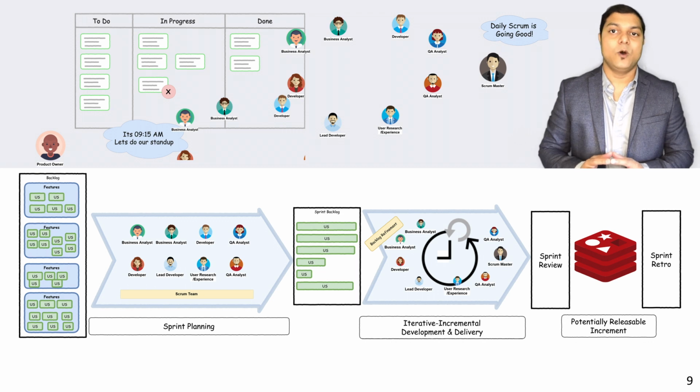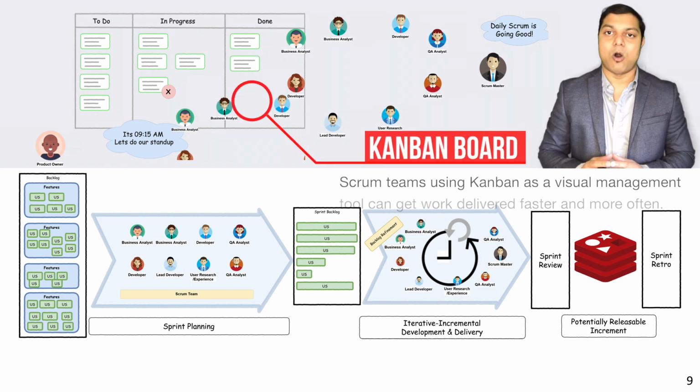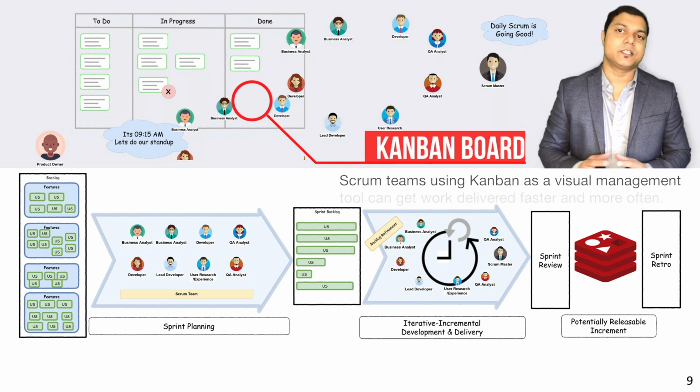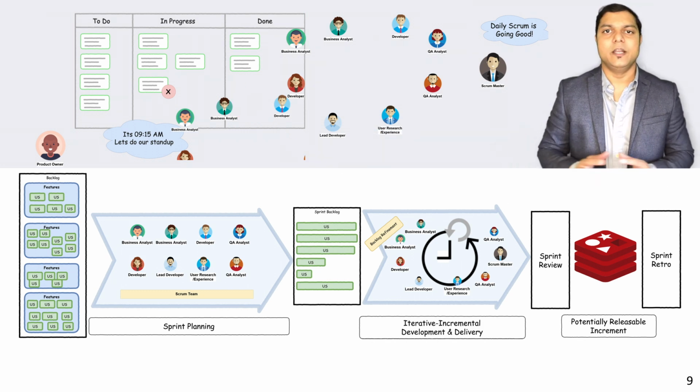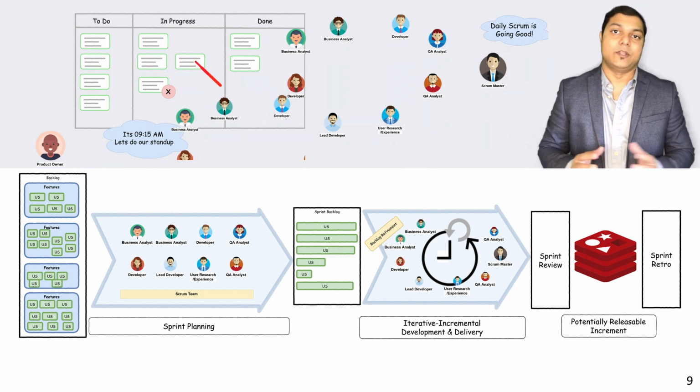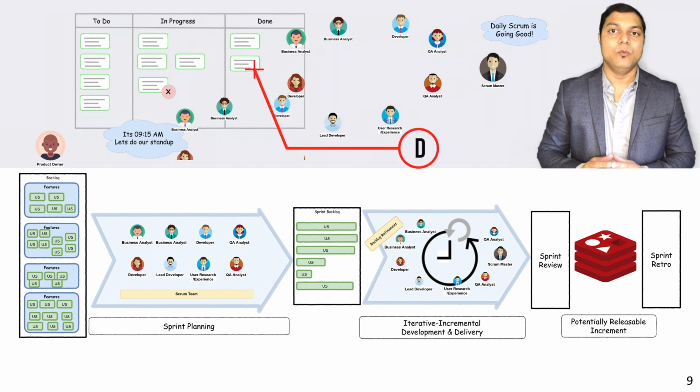To track the current working process, a task board is commonly used. There are usually big cards with the names of particular user stories and a bundle of little sticky notes with a description of single tasks which are needed for implementation of the particular user story. These cards are arranged according to their importance. When work on a task has been started, the corresponding sticker is moved from the to-do field to the in progress one. When the work is completed, the sticker can be moved to the testing field. And after the task is successfully tested, the sticker goes to the done field.